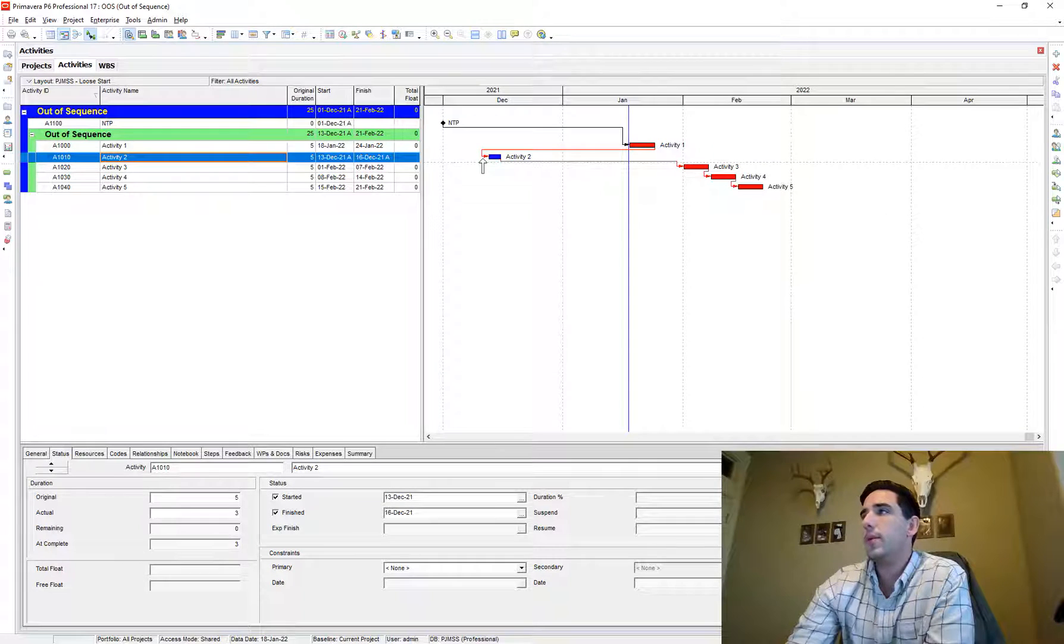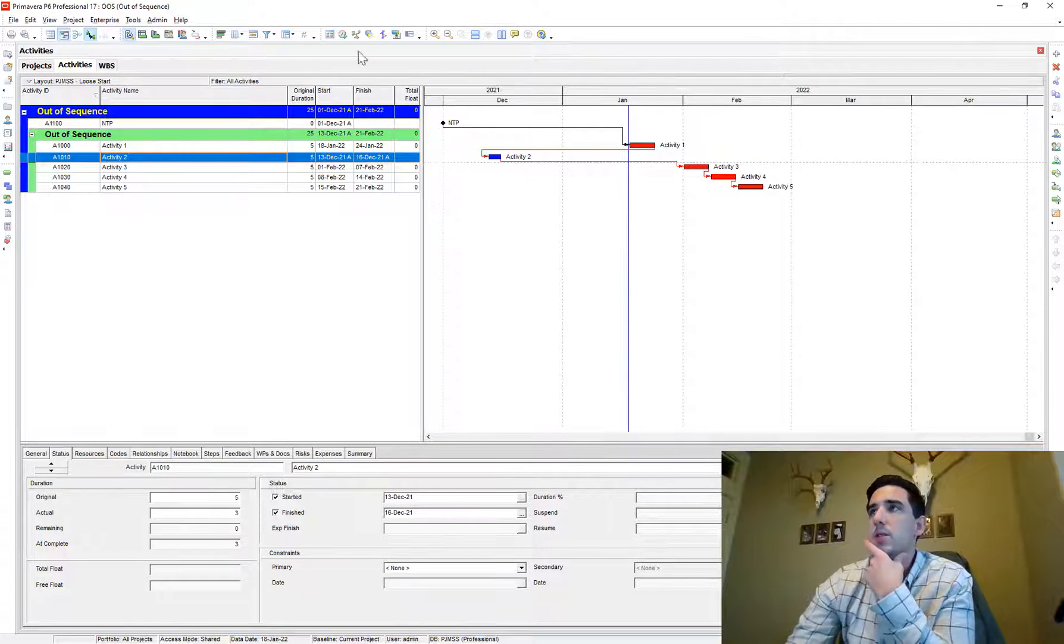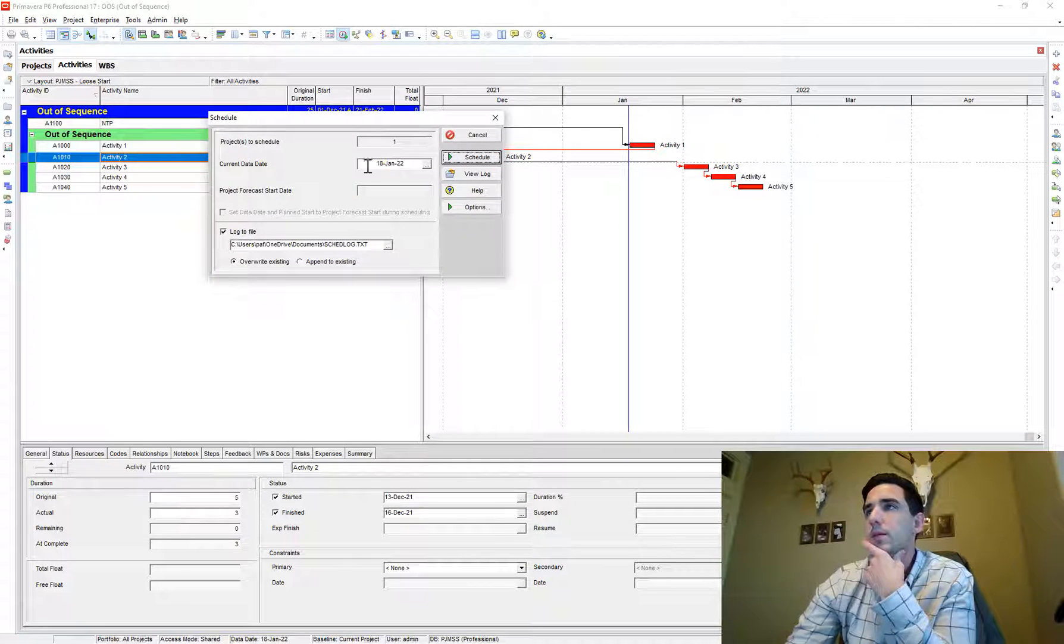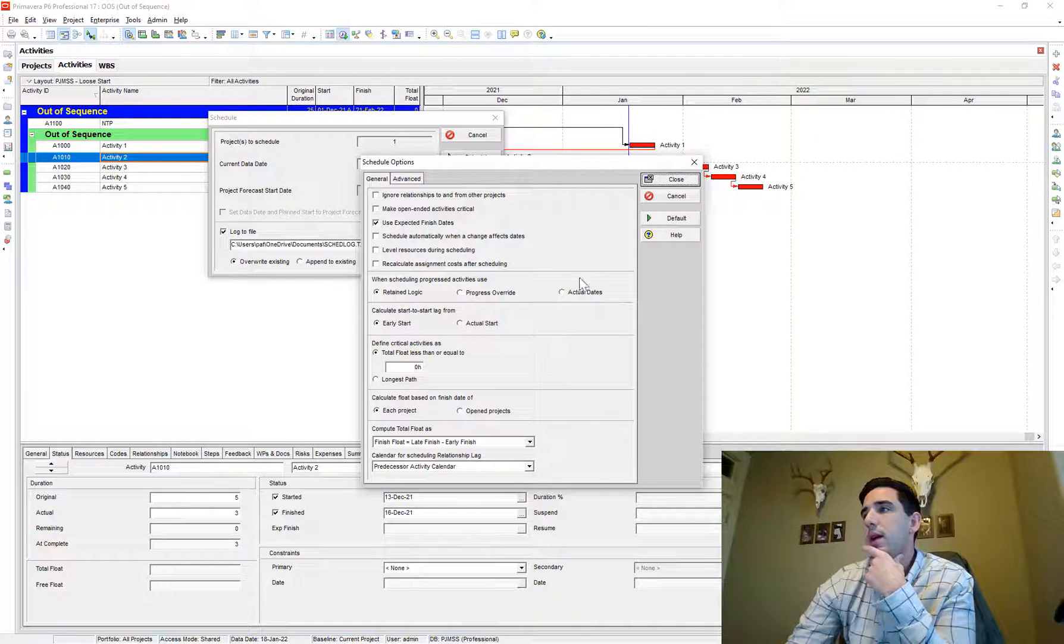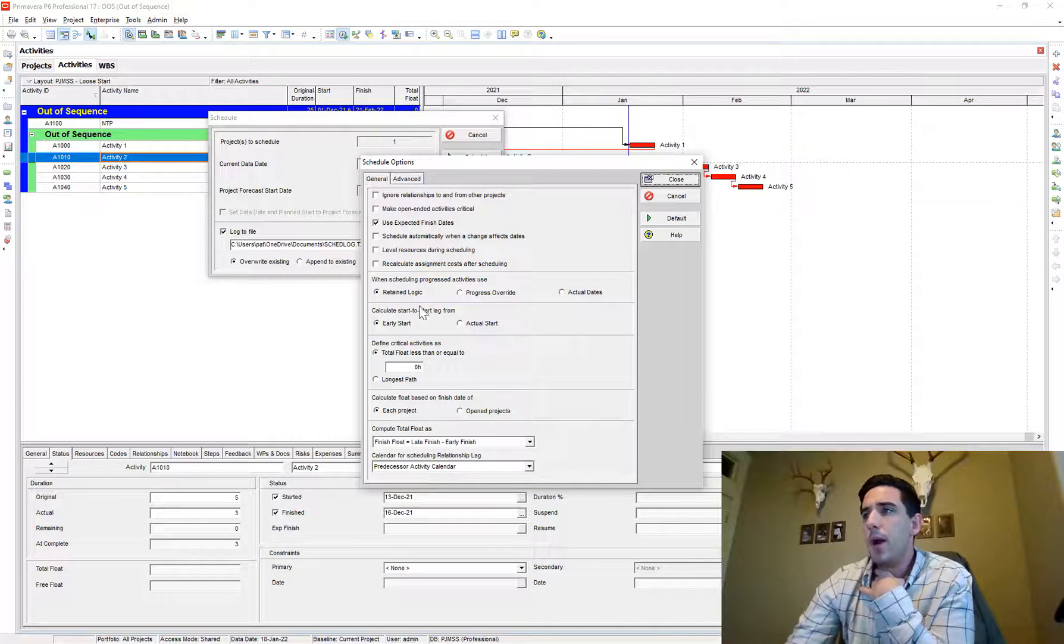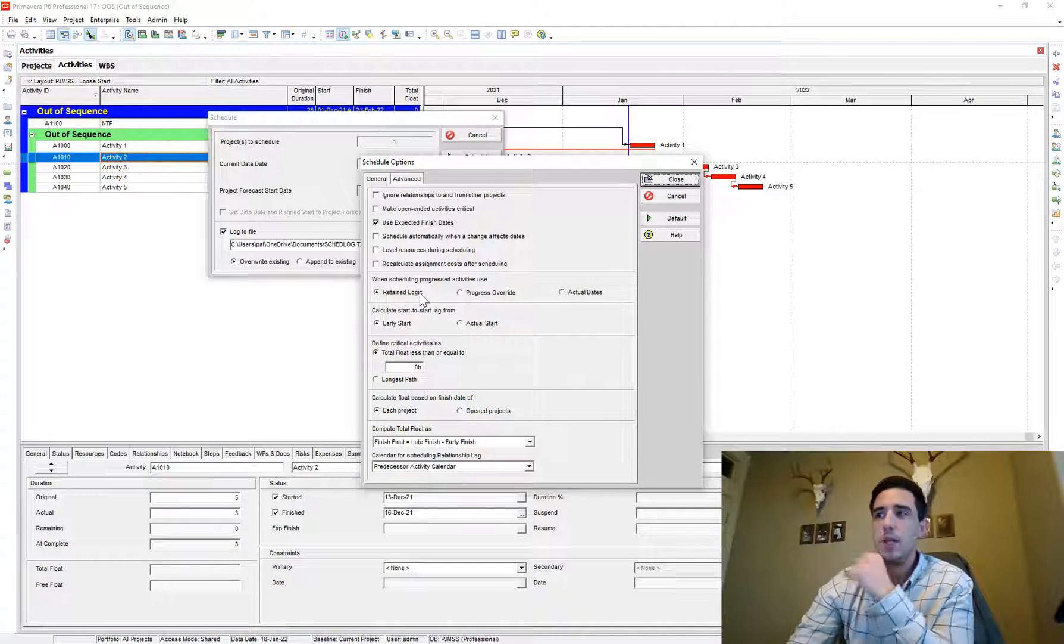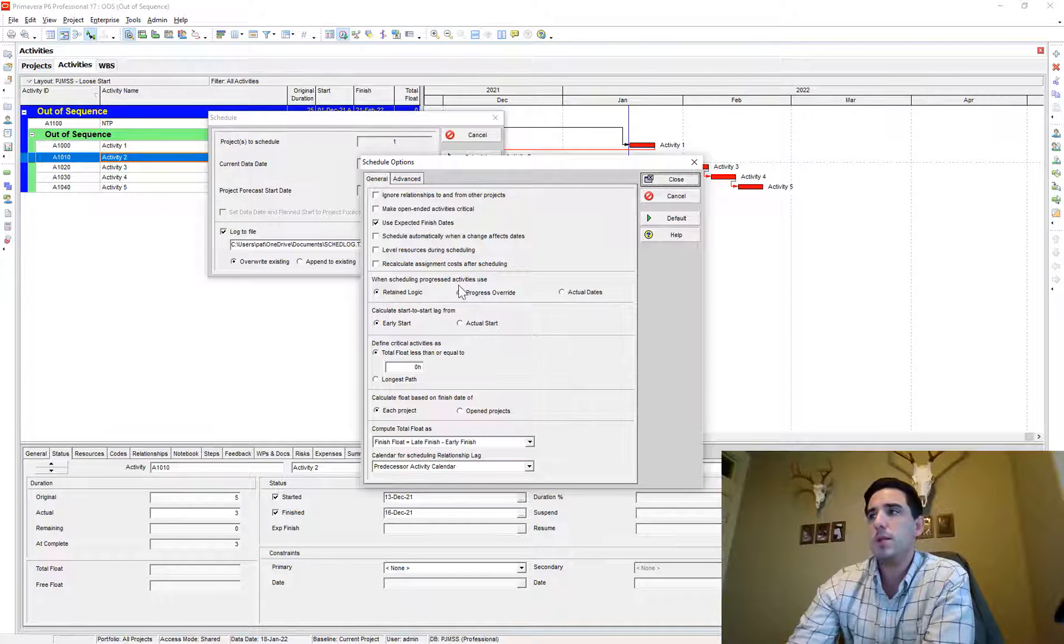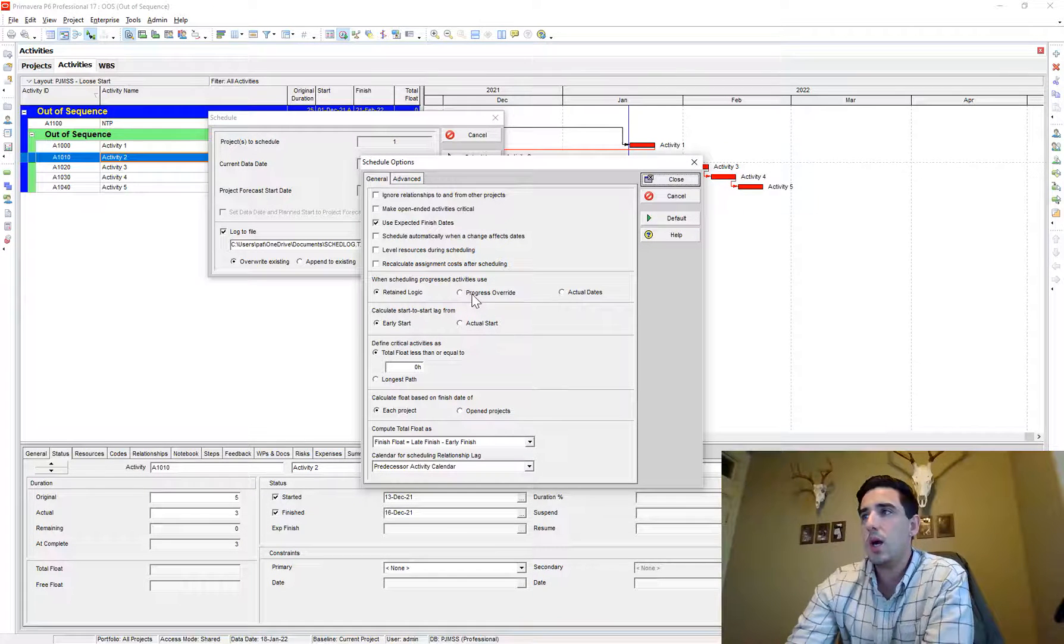So there's two forms of scheduling that are primarily used. If you go to your schedule now button, your F9 hot key, and you go to options, you'll notice there's three options down here. Most people don't use, I haven't seen instances of people using actual dates. The primary one you're going to see required on your project is retain logic. It's very common and seldomly you'll see people use progress override, but it's good to know what the difference between those two are.